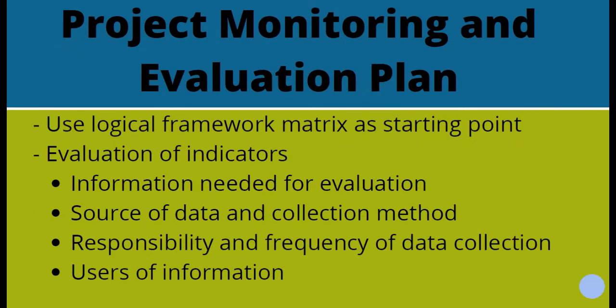We're going to develop a project monitoring and evaluation plan. This will be based on the logical framework matrix that we developed earlier. In evaluating our indicators there are several points to consider: first, what particular information do we need? To create that information we need to gather data — where will we get the data and what method of collection will we use? Then, who's responsible for data collection and how often does it happen? And finally, who are the users of the information when we collect our data and perform our analysis?